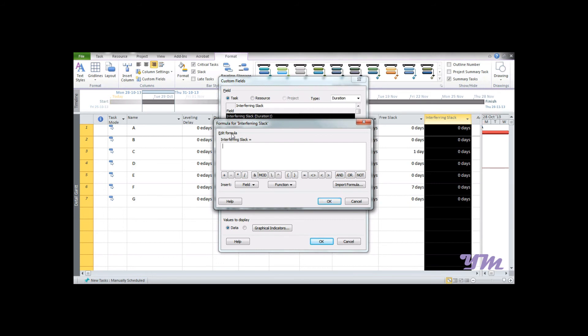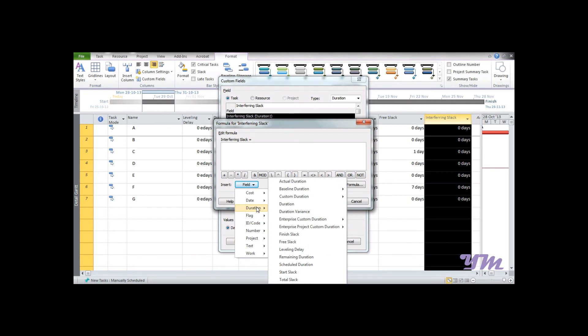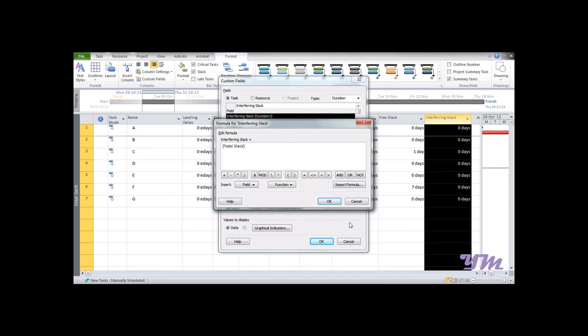You can see over here: we have 'Edit formula: Interfering Slack equals to...' Now we need to select the field. Our field is Field Duration, in which we have Total Slack. As we discussed earlier, it's displayed in days, so it's a part of duration. We went to Duration and we can find Total Slack.